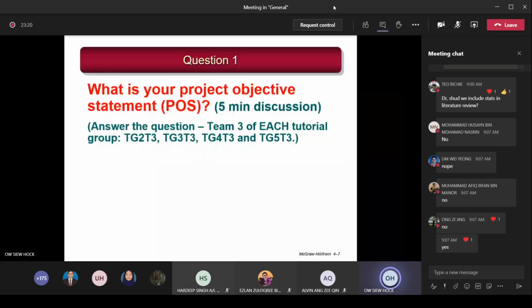So you may say, oh, I don't think I can see any costs incurred. There's no expenses. But there are expenses. You have to treat that the people doing the project are paid salary. So when you do this survey, somebody is going to design the survey form. No doubt, I already prepared the survey form for you.